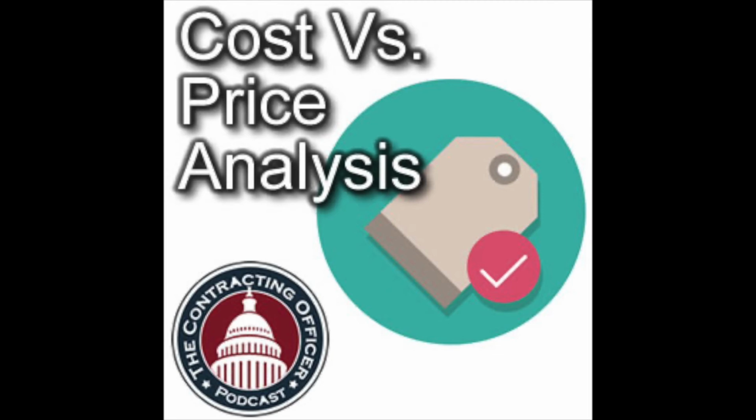In other words, if the price was considered fair and reasonable during the source selection when it was exposed to competition and nothing's really changed, well then the price is still reasonable. So the facts around it haven't changed.